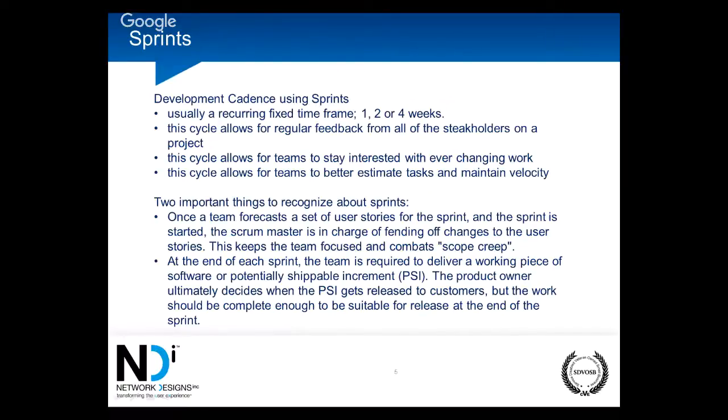If I know I'm going to be on vacation for 2 days, I'm going to reduce my velocity when I give you my report at the end of this sprint. I'm going to say, hey, I'm gone for 2 days, cut me down to 30, cut me down to 20 points instead. So the sprints allow for a lot more flexibility, a lot more maintainability when it comes to determining the amount of work to be completed within that 2-week time frame.